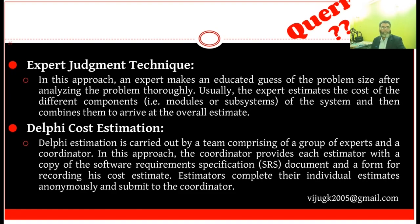Expert judgment techniques: in this approach, an expert makes an educated guess of the problem size after analyzing the problem thoroughly. Usually, the expert estimates the cost of the different components — that is, modules or subsystems of the system — and then combines them to arrive at the overall estimate. It refers specifically to the technique in which judgment is made based upon specific sets of criteria and expertise acquired in a specific knowledge area, product area, particular discipline, or industry.